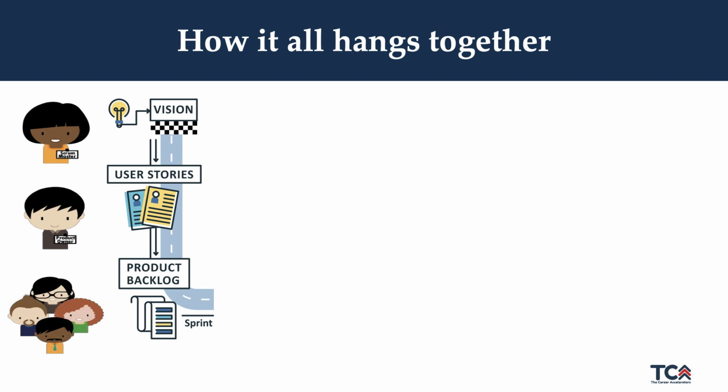Based on the vision, a set of user stories will need to be established. These user stories can be split into high-level user stories and detailed user stories. By high-level user stories, we're talking about our features or our epics. So at that high level, we establish what activities we need to carry out and what functionalities we need to deliver to meet this vision.